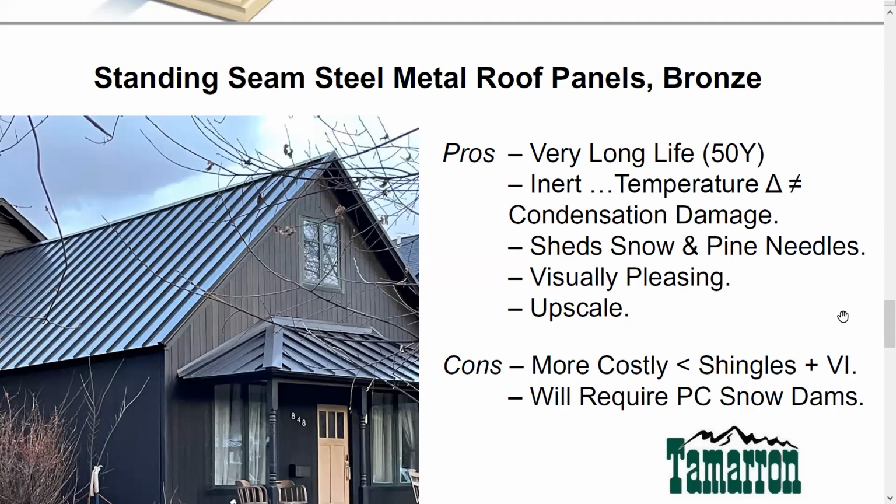There should be some guttering done back there, and we need to take that water someplace. And we do have some ideas. Because if it comes off that roof onto the covered parking, we end up with these glaciers. The only way you get them out is when it starts softening up in the late winter, and you have to go in there with the backhoe and break it up. Then you take the risk of messing up the parking lot. It's a horrible situation. So if we take that water and gutter it and do something with it, and like I said, we have some ideas, we'll just have to talk about it. It's a better situation than just letting it drip off and freeze.